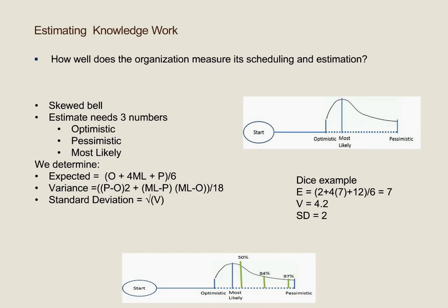The analysts wanted to apply basic statistics to this and determine the standard deviation of the work. This is more complex. First, you must determine what is called the variance. The formula is shown on this slide, and I recommend that you set up a spreadsheet to work this out for you.